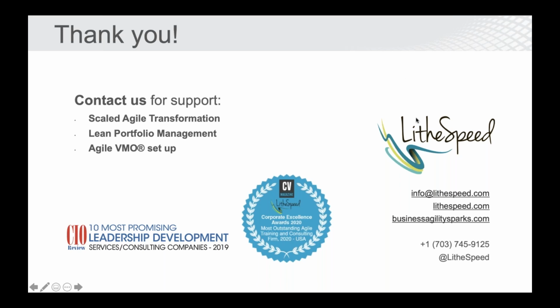And I would add something else to that: it may be on both. It may not move off of one and onto the other, but be on both at different levels of granularity. So it may be something that the portfolio team is still concerned about, and it's in development, or an initial delivery has been made into production, and we're waiting to see how that goes. And so it's on the portfolio board. But at a lower level of granularity, it's also on the program board, where it's being turned into lower level MVPs, features. Where are we in the PI? Is it ready for PI planning? Is it in development, et cetera? And so it could live on both boards at different levels of granularity at the same time.